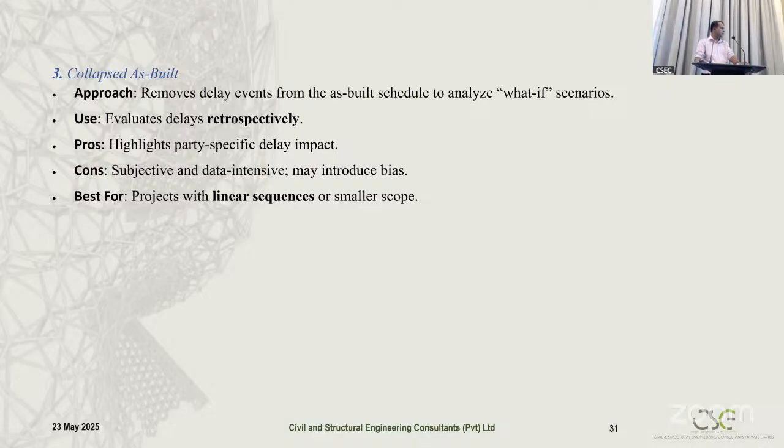So if we don't have actual data, or if the data has been manipulated, that may give some bias in the analysis. And this is best for projects with a linear sequence or smaller scope. So we are not recommending using this in complex projects.